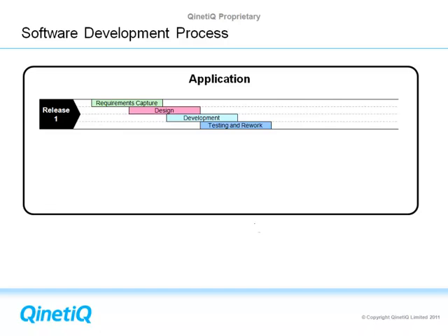Defects will be found, there's always defects in the code, which will then be either reworked, the code is corrected, or there's a correction that's been made in design documents, which then results in more development work, or the defects will be parked and not actually fixed. So they've been identified, gone through a triage process, and then flagged up as being present but not critical to fix at this moment in time. So that's a standard way that software is developed by the client.